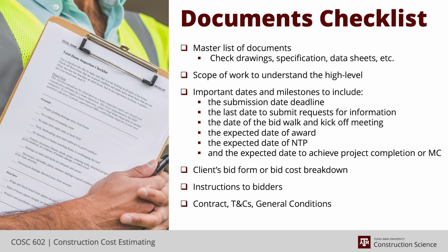Client bid form, that's important. A lot of times that gets forgotten until the very end, and then everybody's scrambling to try to transpose their cost and their summary sheet into a client's bid form. Seems easy, but numbers get dropped. And that happens when it's forgotten or left to the very last.